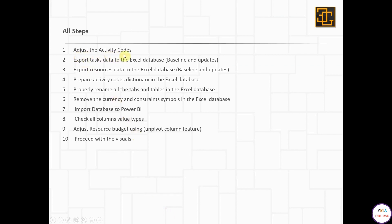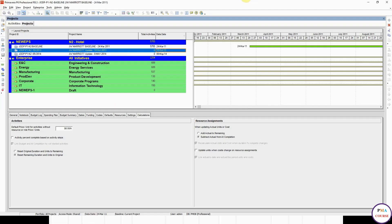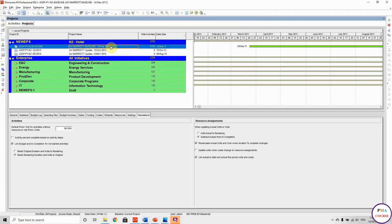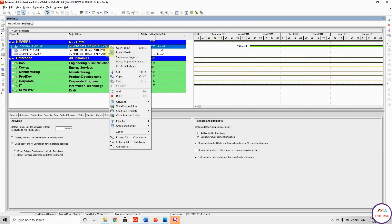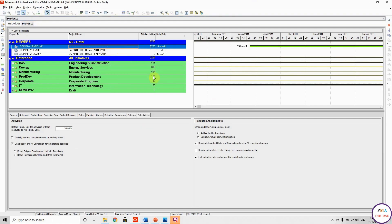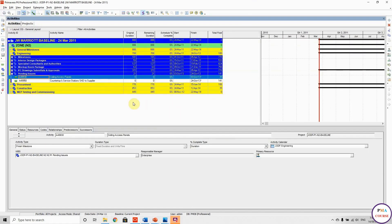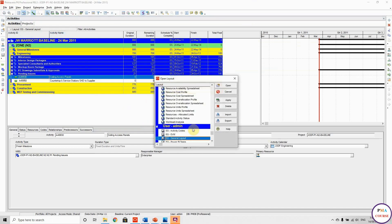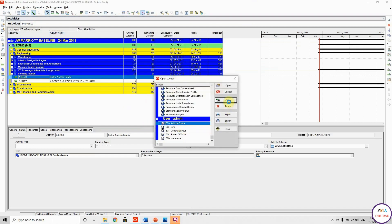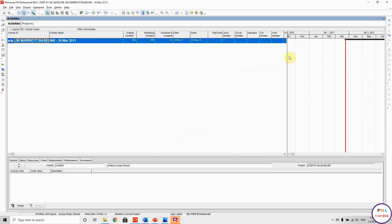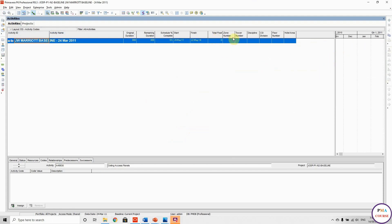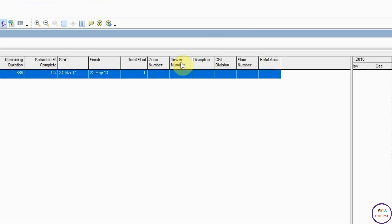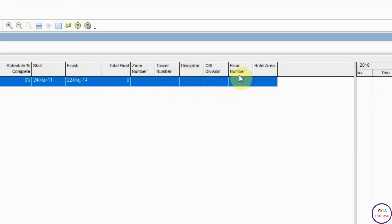Step one: adjust the activity codes in Primavera. Let me open the baseline and show you my activity codes. I'll open the layout — this is the activity code view. Here you can see all my activity codes: zone number, division, side division, floor number, and hotel areas.